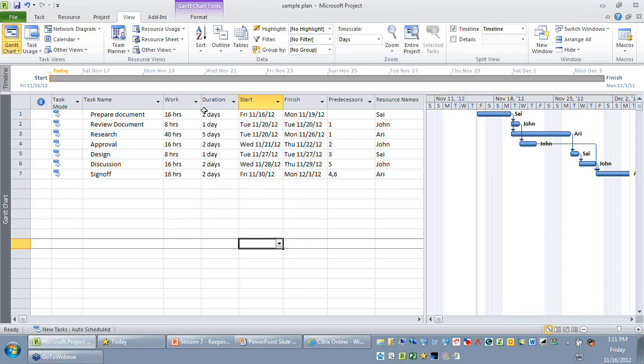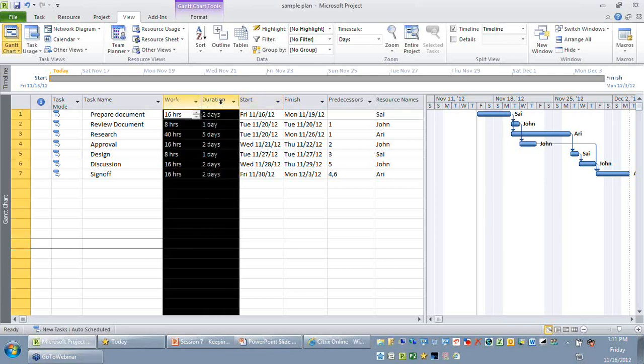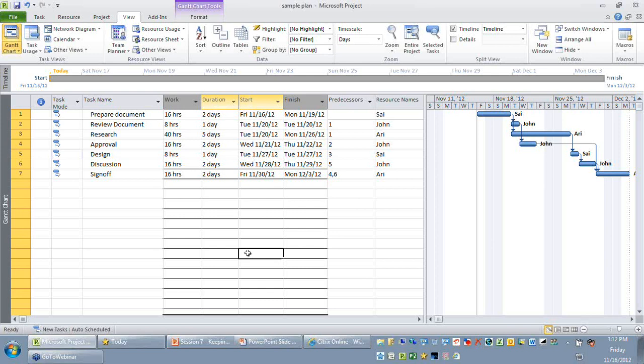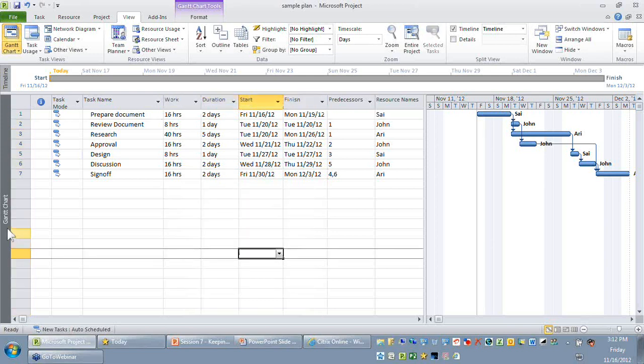When we say we need to take a copy and save it, it's not that we should save it in a separate file. We are just going to take a copy of these fields, what I have just highlighted, into another set of fields in the same MPP file. So the first step is we need to understand the view you are now looking at. As you know, the view is the Gantt Chart view, and currently the table we are looking at within this view is the Entry table. You can observe on my top leftmost corner, the small tooltip reads Table is Entry, View is Gantt Chart.